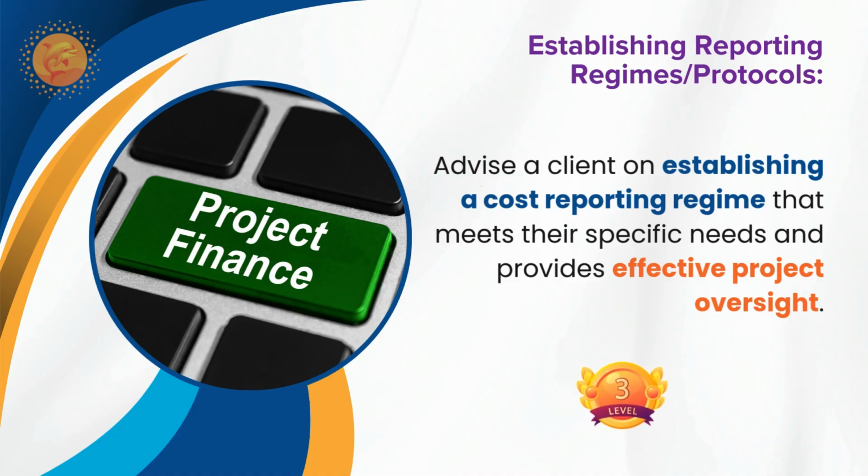And of course, change. You have different variations at different stages. Some of them are already agreed, some have proposals received but are still yet to be agreed commercially, or some are just instructed and have no evaluation of cost or time impact. So those kinds of things will also come proactively, so you know of any deviation from the project cost.